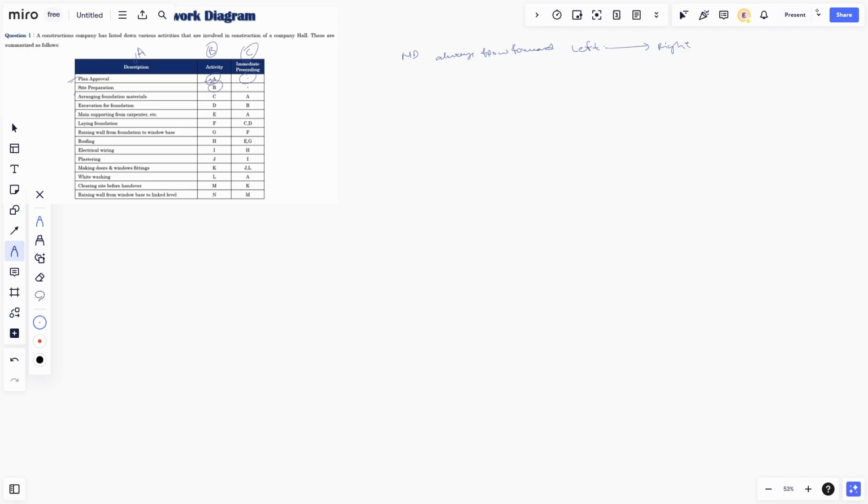As we already discussed, a task will be denoted by an arrow, and the duration or the time taken for the completion from its initiation will be marked as a node, that is a circle. So let's start. This is the first node. This is a task independent in its own nature, going to node 2.